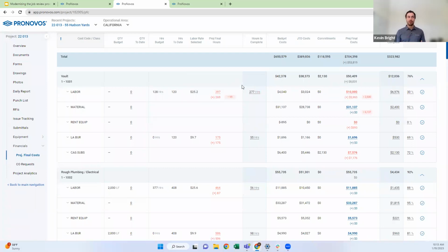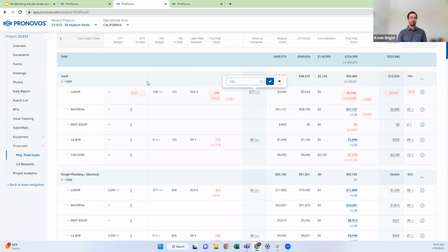I don't think people intuitively know what their projected final hours are going to be. More realistically, what they're going to know is how many hours they need to complete. So they might say something like, hey, I've got 3 guys on site for one more week. That's 120 hours. Let me put in my 120 hours to complete. It's going to multiply that by your labor rate to get to your projected final cost.